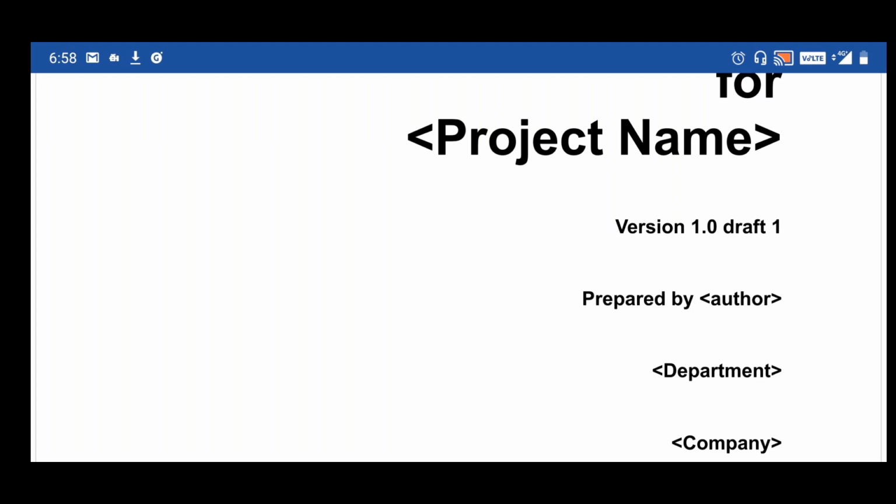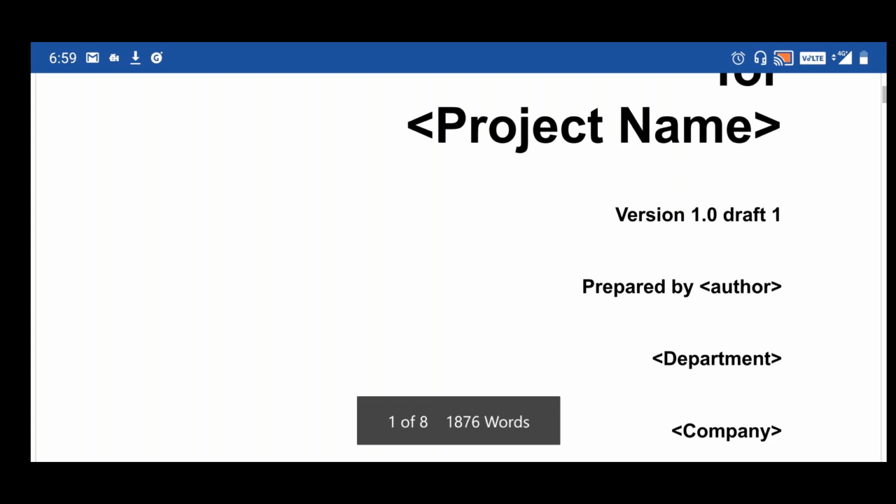Now, for any major change or enhancement, the documents are still created, but along with the documentation, we break down the requirements and add them to the Jira tool as user stories.